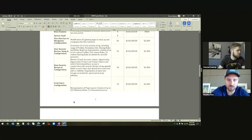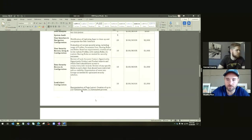And I would just say, these are the limitations down here. And if you want to walk them through the SOW, you could say, this is how we've given 10 hours to this. And so I have to put some limitations around what it is we can accomplish in a certain amount of time around these topics. So these are down here just for, if we do all of these things, we have to know that if we want to add more validation rules or more automated processes or more fields or whatever, then we're going to have to talk about additional hours for that or pulling them from somewhere else.